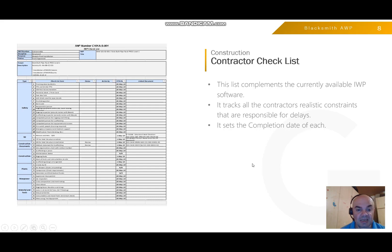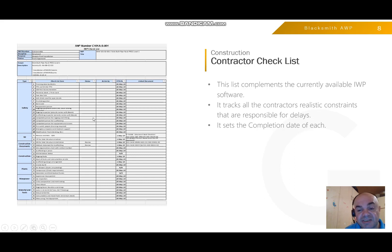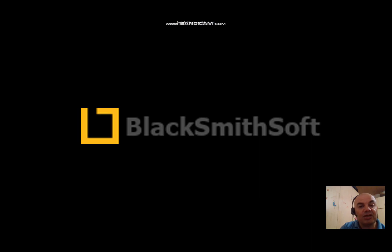The contractor checklist — which we normally call the front-end loading checklist — contains many items to follow: safety, QC, construction, and so on. Most importantly, we also added into this checklist the previous work that needs to be completed by other teams for this IWP to start. With that I conclude the lesson — watch for our next video which will use an actual tool to manage Workface Planning. Thank you for your attention.